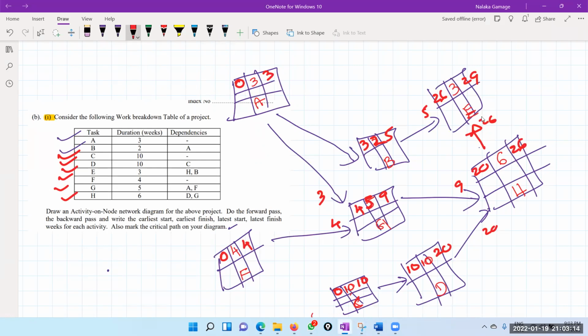Right. Now this is 29. So therefore we take this one as 29 because that is the biggest value. 29 minus 3 is 26. So therefore the biggest one is 29. Therefore we can take 29. 29 minus 6, 23. Okay. So that 23 comes here. Therefore this is 13. That 23 comes here. So therefore this is 17. Then this 26 comes here. So therefore this is 24.